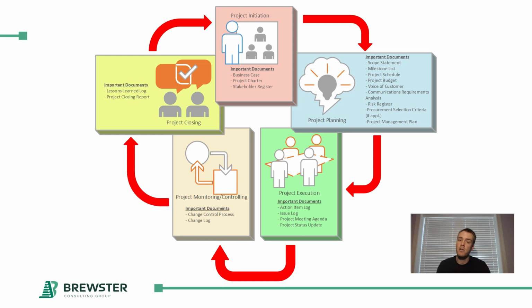The project charter really authorizes your project manager to wrangle the resources, like the humans, that are necessary to complete the work. So this is typically signed off on by an executive sponsor that essentially says, yes, we realize these people at our organization work 40 hours a week. They can allocate 10 hours of their week towards this particular project because we believe there's going to be an ROI that comes from it. And again, that project charter is usually signed off by an executive sponsor.